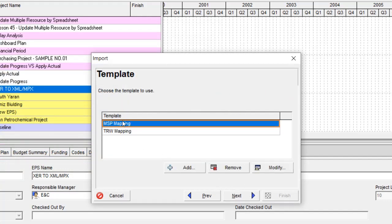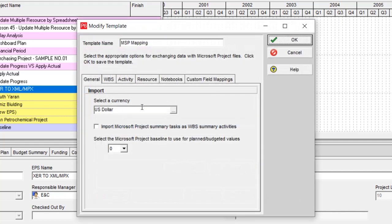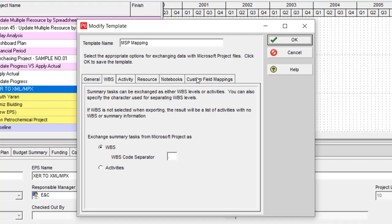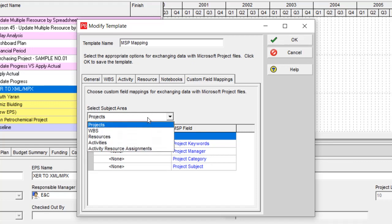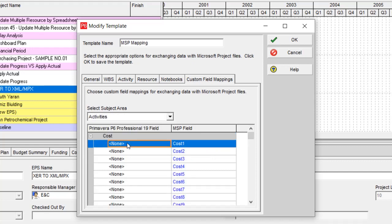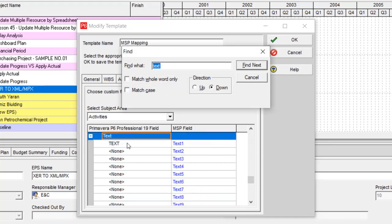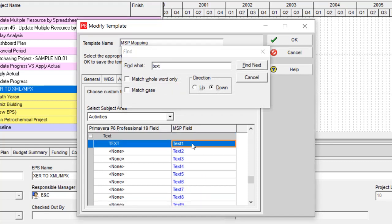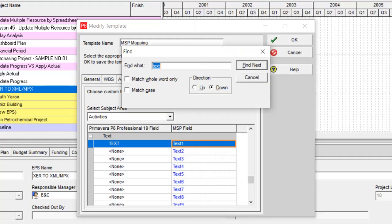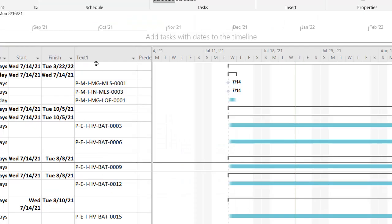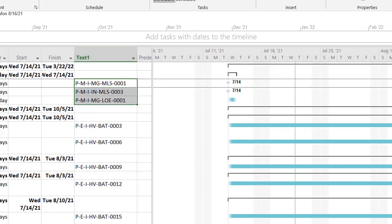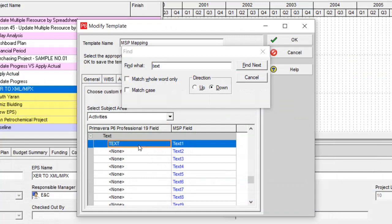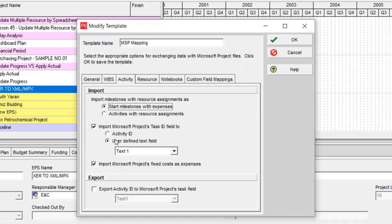Then proceed by MSP formatting mapping. I want to notify you about some useful things. Maybe you insert the activity ID on your Microsoft Project file. So you can select Activities over here, then I select text. These are the text fields. This is the text one. Let me show you something. I insert my activity ID to the text one.